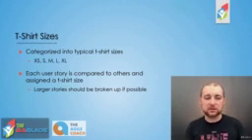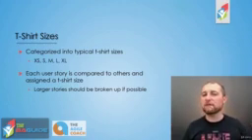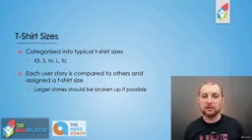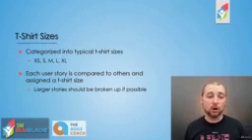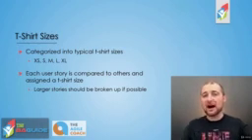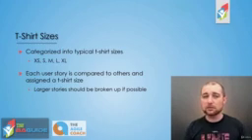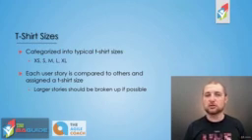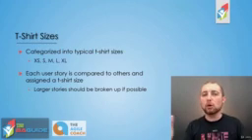Next, let's look at T-shirt sizes. This one has multiple buckets. You usually have 5 buckets as part of this. You have an extra small, a small, a medium, a large, and an extra large. So those are the 5 buckets that the features can be estimated into, and they go along with relative T-shirt sizes. The reason I think T-shirts are used is because it's very global.